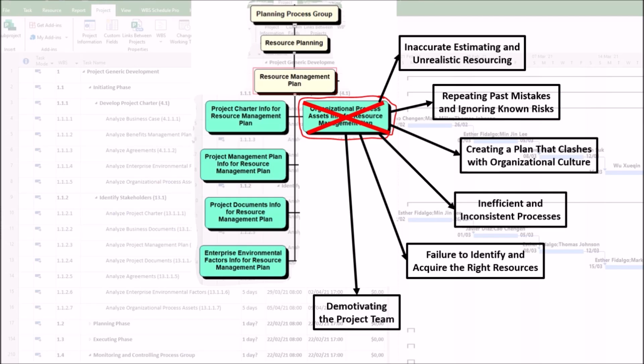First, ineffective rewards. The reward system outlined in the plan, such as individual bonuses, might conflict with what historical lessons show actually motivates teams, such as team-based recognition and professional development opportunities. Second, ignoring feedback. If past teams reported that excessive reporting killed morale, and the new plan introduces even more reports, the team will be demotivated from the start.